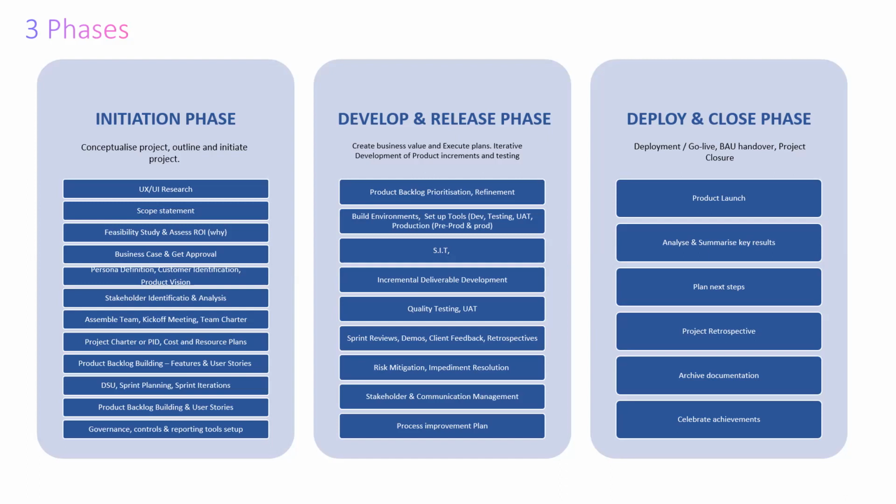And that day I gave you an example of a building. You want to build a house. There are various projects within it, but you need to have a justifiable business case for the house you're building. Now, we would have a project charter for the electrical work, for the plumbing work. We may have project charters for the bricklaying, or for the flooring, or for the plastering, for the roofing, for the windows. So there is no need for us taking it too far apart from themselves.